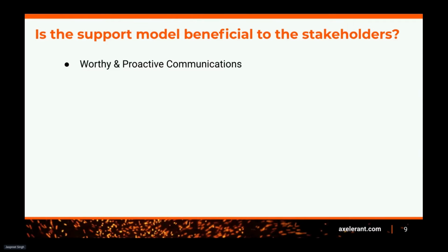Moving ahead, next one is fixed fee model. If the client signs the contract for a year, at least you'll get to know that in a month you are supposed to consider 30 hours, 40 hours, or 50 hours of consumption. And in those fixed number of hours and cost, what you are providing to the client is that you will cover the Drupal security updates, you will cover the uptime and downtime issues, and you will take care of very cosmetic changes which can be covered in less than 1 hour. These are examples which can be covered in the support and maintenance process.